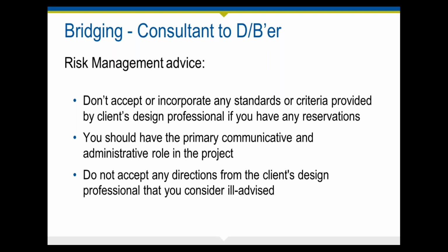Although the independent design professional will be responsible for what they develop, you will also be responsible under the design builder for what is incorporated into the design, the final design drawings, because you now assume responsibility for that. And you're the one who will be stamping those construction documents, signing and sealing them.